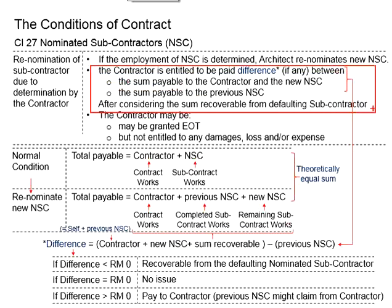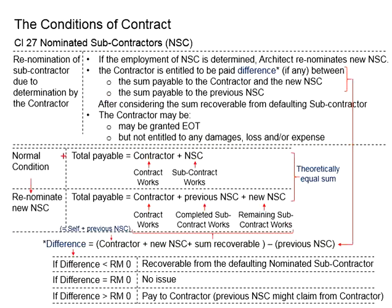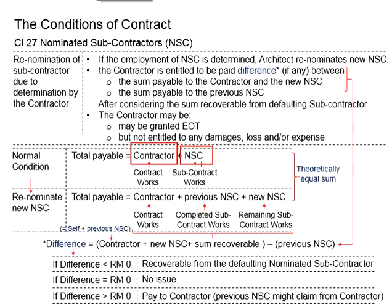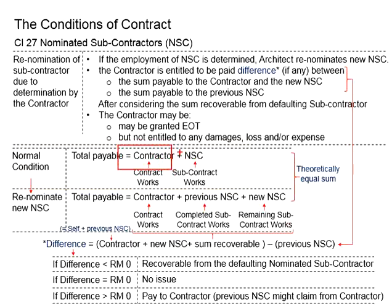To fully understand this, let us look at the diagram. This represents the normal circumstances. The amount payable by the employer shall be equal to the amount paid to the contractor plus the amount paid to the nominated subcontractor. The contractor is paid for the works under the contract, while the nominated subcontractor shall be paid for the subcontracting work done by him. Under normal circumstances, everything runs smoothly and everyone gets their parts.